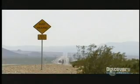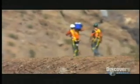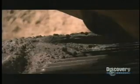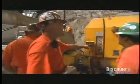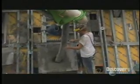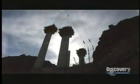There's the heat. It's a bridge made of concrete, but in searing temperatures scorching over 120 degrees Fahrenheit, it's almost impossible to keep the concrete cool enough to pour. If it sets too quickly, it blocks the pipes or cracks. Result, disaster. And that's before you factor in Mother Nature.